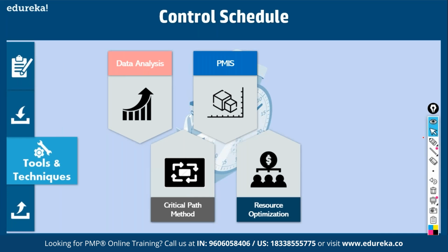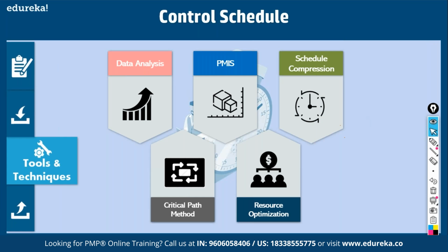What is resource optimization? For example, I told you John might be allocated 16 hours of work. So you make sure he does it in 2 days. That is called optimization. Fine. And what happens in this process? Just a moment. Schedule compression. I told you fast tracking, doing activities in parallel, right? Then leads and lags can be employed. A lead will have the effect of advancing an activity, right? If you advance a successor activity, it'll reduce the duration of the project, isn't it?